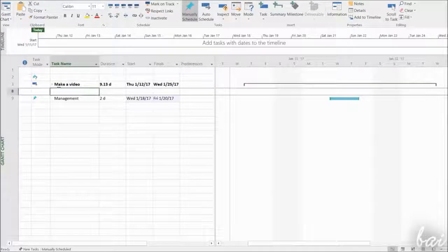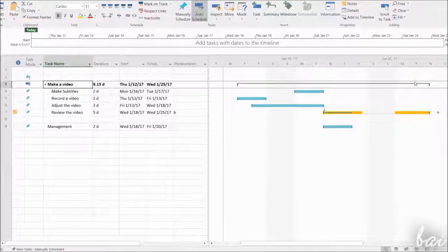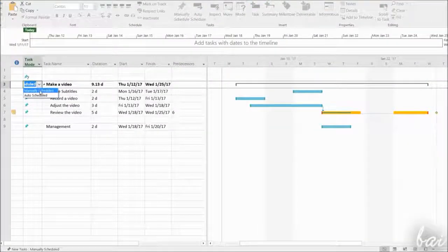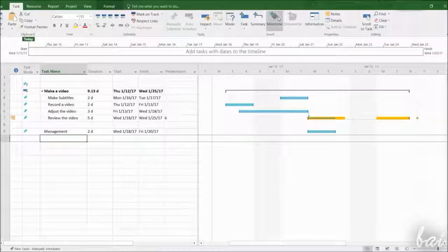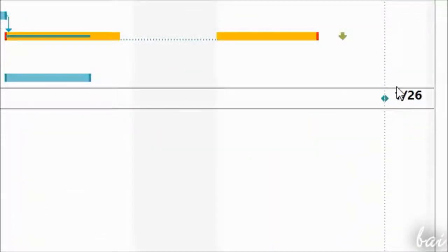In the Gantt chart, the summary is a simple container, long enough to contain the earliest start and the latest finish date of all its tasks. Just in case the summary is defined as manually scheduled, you are able to modify its duration directly. Just include all the relevant tasks in the time, or it will show errors indicated by a red-colored bar. The milestones are used to fix a goal. Inside the Gantt chart, this is a single point with a label indicating its day and month.